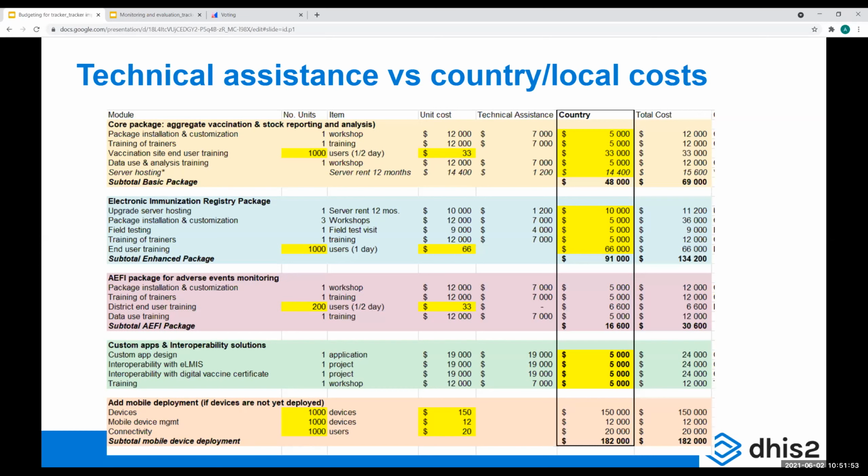There was a question here: what activities or items are involved in field testing? Under field testing, it is typically travel, per diems, hotel, gas, and time for a consultant maybe to help out.